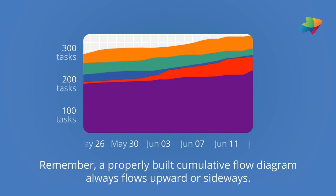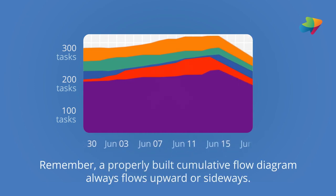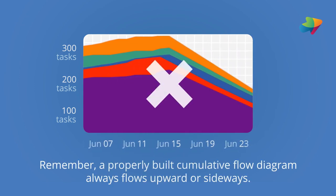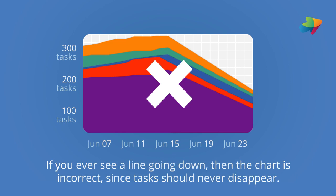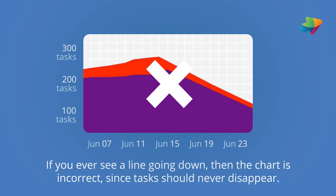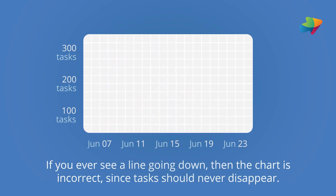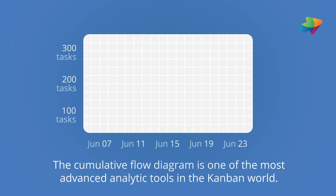Remember, a properly built cumulative flow diagram always flows upward or sideways. If you ever see a line going down, then the chart is incorrect, since tasks should never disappear.